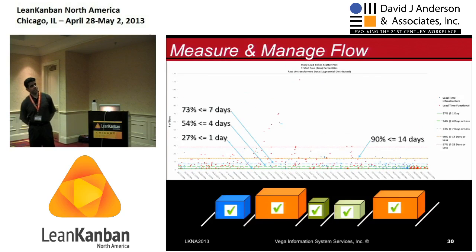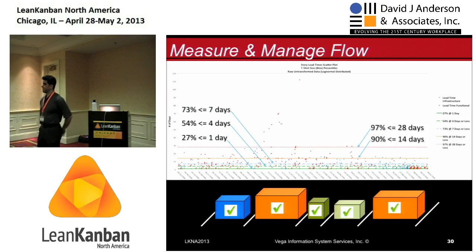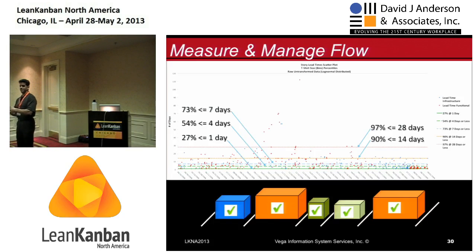Got to go through the animation there. It's those same intervals, if you will, that I showed on this previous bar chart, frequency table, and just now showing you a temporal view of this information as well. So now, not only did we know how many of those small and medium and large things we should see, we got a really good idea of when we would start to see some that were just a little too big, and we could start to learn, well, what happened during that time? And so we really did a lot more than just, quote-unquote, getting rid of estimating. We really learned how to better understand our system.